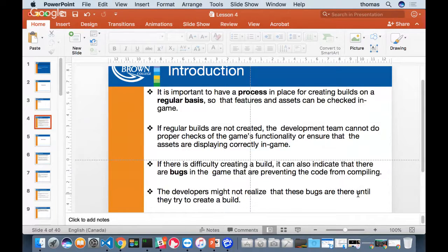But every release has iterations. Each iteration can be considered your build in our context, all right? So what I mean by that is, what's an iteration? It's when you add a particular feature set to the build that came before, or you fix bugs, anything that basically changes your product from what it was before to what it is now is this new iteration. And you're always moving towards this idea of another release.